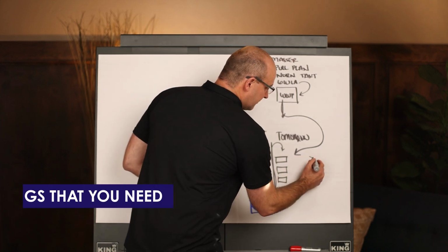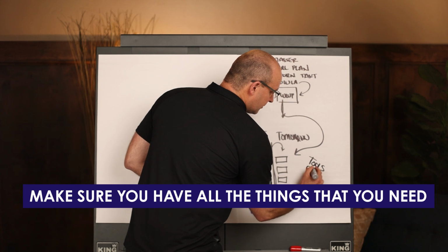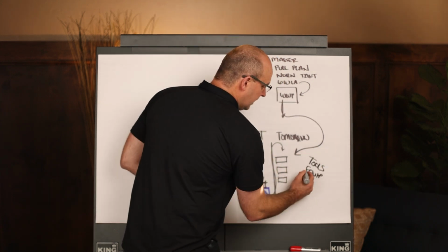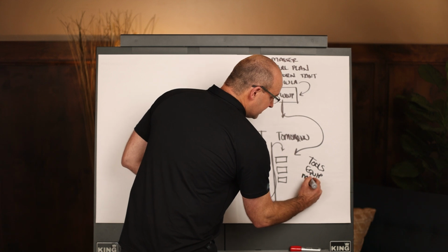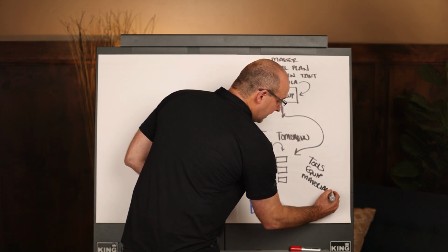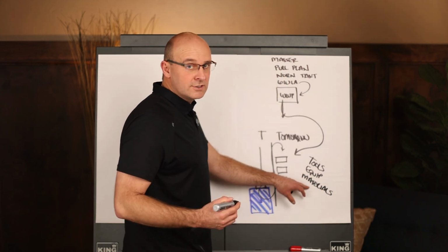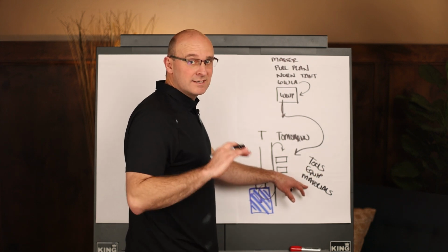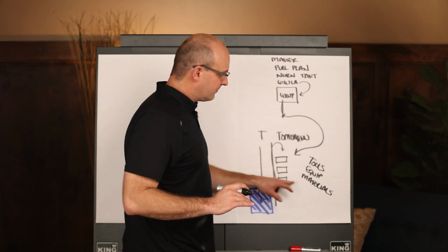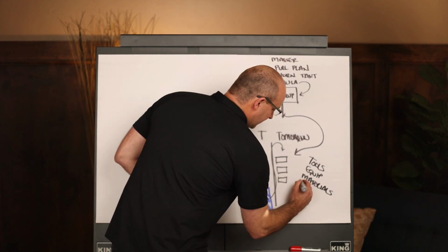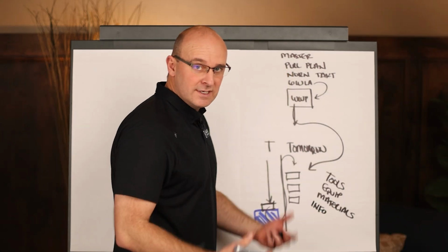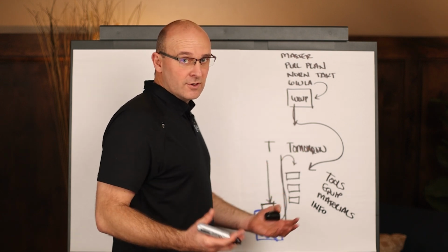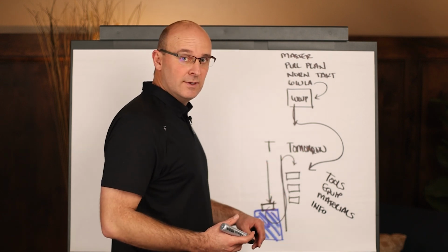Okay, so what we really want in this meeting, in the day planning meeting, is to make sure that you have the tools, the equipment. I mean, you're an expert at this, so I'm preaching to the choir right now, but tools, the equipment, the materials, this is a key item. A lot of times you're encouraged to do it the next morning. No. Let's pre-stage the material, let's inspect it, let's shake it out so that you have it for the next morning, right? The information, if you need any permits, if you need a printed RFI, if you need some information from the drawings, if you need a clarification, now's the time to do it, right?